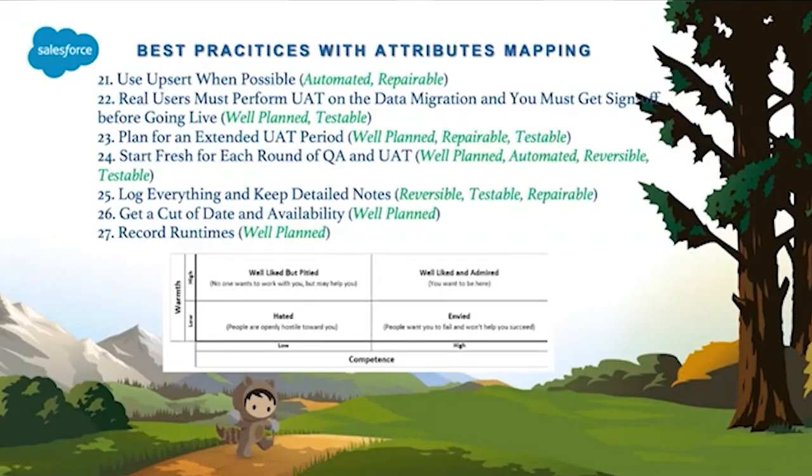And when they started production migration, it took nearly 72 hours for them to migrate successfully. And the challenge is the downtime was never communicated. The cutoff date was never finalized. And that in turn will bring in a lot of data integrity related issues. There will be a revenue loss due to this downtime, and the stakeholders were not informed well in advance.